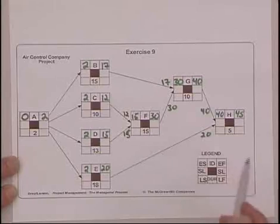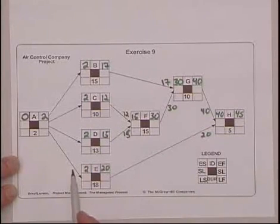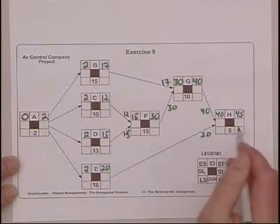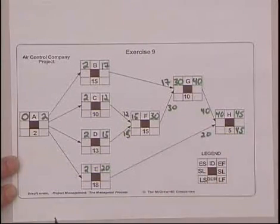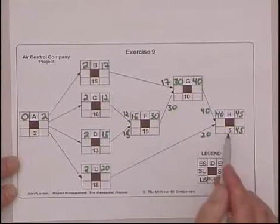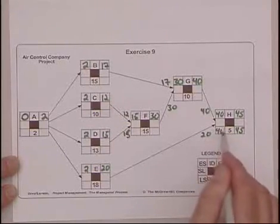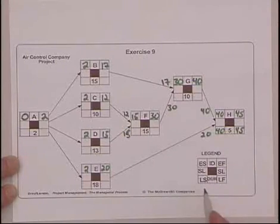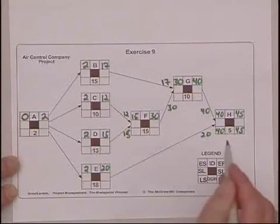Now the late finish, we go backwards and this time we subtract. And instead of choosing the larger number, we choose the smallest number when we're forced to make a choice. So the latest H can finish without delaying the project obviously is 45. 46 would mean it's a day late. So the late finish and the early finish for the last activity are always the same. We subtract 5 from 45 and the late start for H is 40. The late start and the late finish is the latest this activity can start without delaying the project.